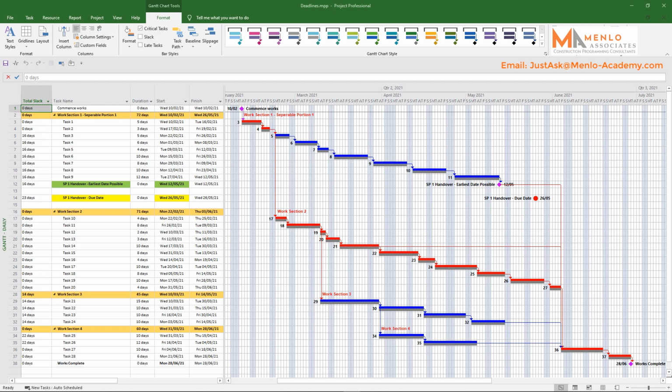Deadlines are better because hard constraints place unnecessary limits on the program logic that are more likely to cause you issues down the line. Unlike a hard constraint, deadlines also give a separate graphical indicator on the Gantt chart, so they're easier to use for visualization.